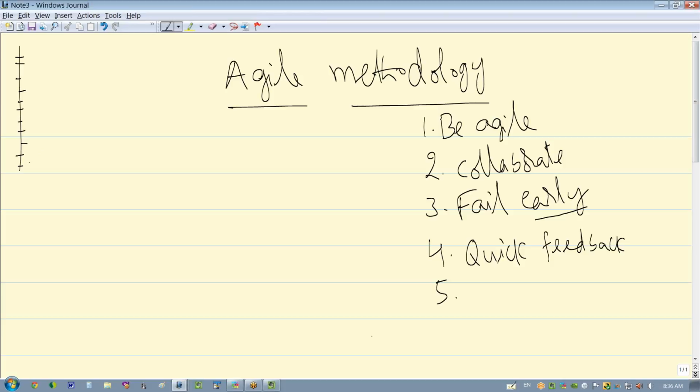What we ask the business user is, hey, do you have a list of things to do? Yes, I do. Okay, can you prioritize them right now? Prioritize each and every single task. Then she will prioritize and say, this is the prioritized list: 1, 1, 1, 2, 2, 2, 3, 4, 4, 5, 5, something like that. And I know now that the goal in Agile is, at any point, you'll be working on the topmost priority item. So you'll always get the biggest bang for the buck.